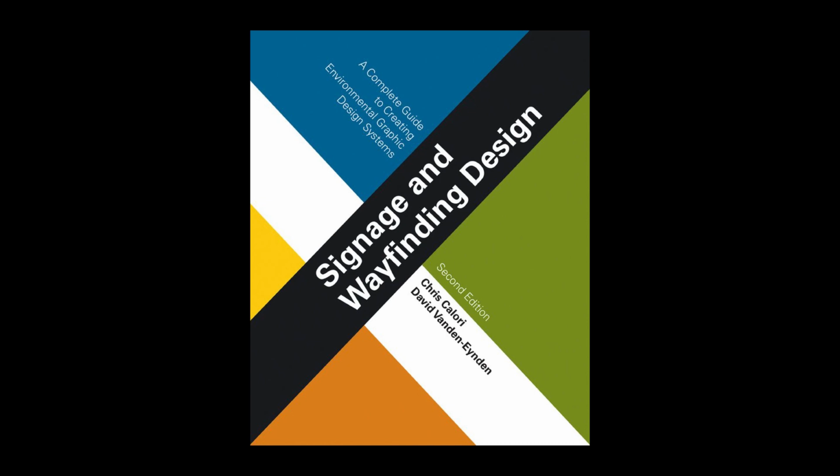Phase 4: Documentation. The documentation phase, which is the final design-centered phase of the design process, begins upon the client's approval of the work accomplished in Phase 3. Phase 4 continues the convergent activity of Phase 3, honing in on detailed solutions and refinements to the subproblems of the sign program. The goal of the documentation phase is to convey the design intent of the sign program to sign fabricators for pricing and production. In other words, the EG designer works out all the details and ties up all the loose ends of the sign program's design before it gets priced and built.